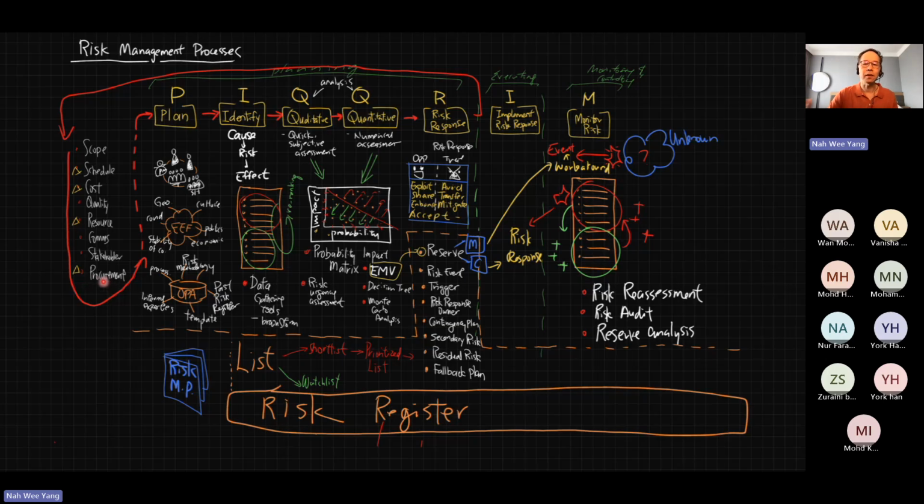So what you can see is that this risk planning towards the end actually triggers some activity that we need to do to replan the whole of our project plan earlier on, that covers the scope all the way into procurement, right? So this is a go-back iteration to get us to replan and then go through this process. You can see the red line, we just follow this red line, going through the loop.